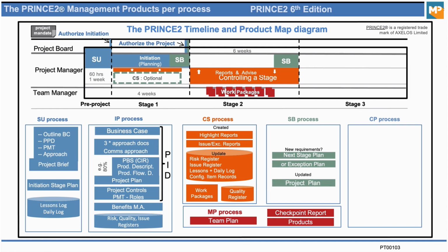Then they will update the project plan because they will mark off work that's already been done. And maybe there are new product or new requirement documents being added, so they need to be added to the project plan. And then the end date of the project will keep going back a little bit at a time. Okay, so that's why they update the project plan. The project plan is known as a living document, so it should always be updated to represent what's actually happening in the project. When we've updated the project plan, we've probably extended it, so therefore the costs have gone higher.